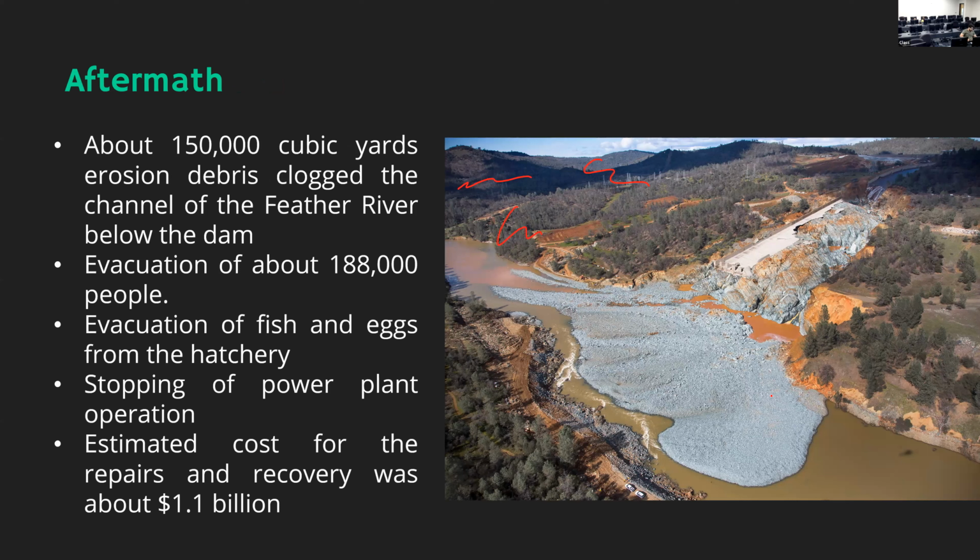In May that year, there was a public hearing, and they were criticized for their decision making and other things. Not sued. I think there have been some issues with the state because they did not fund the repair, and the state had to pay a lot. Later on, I didn't find any case of a lawsuit. The estimated cost of repair and recovery was 1.1 billion. I'm not sure whether there was supposed to be a lawsuit because of the poor maintenance.